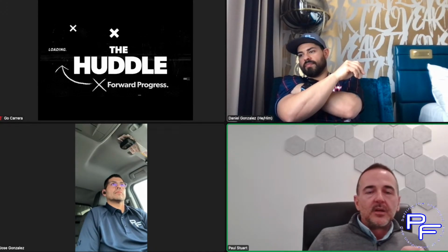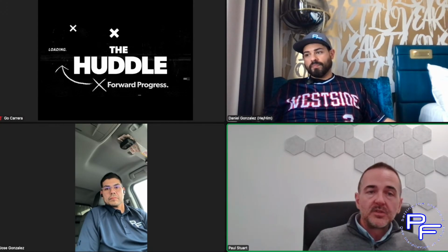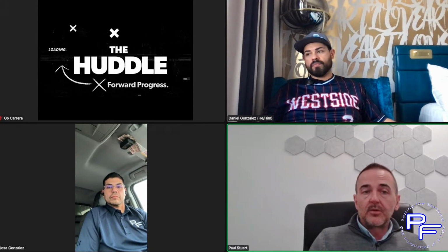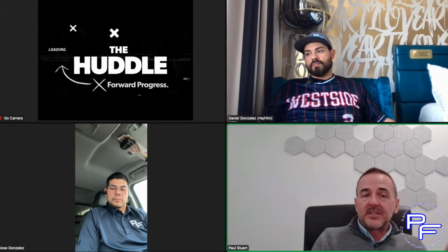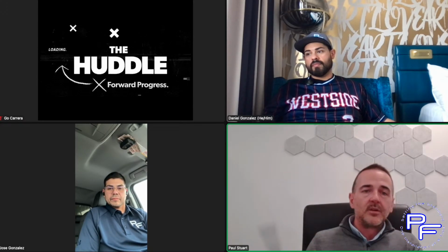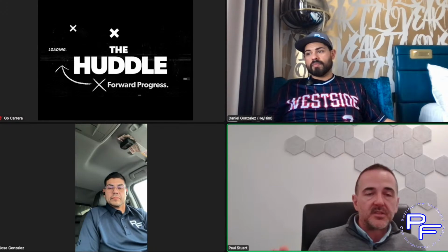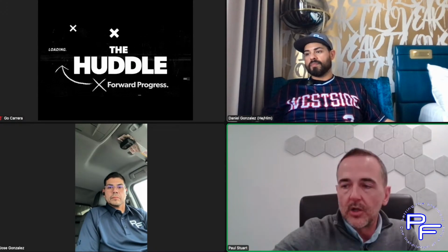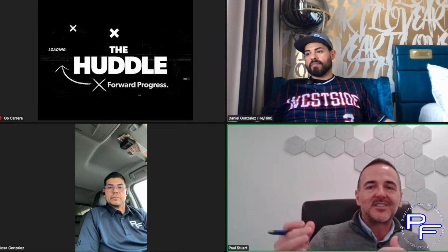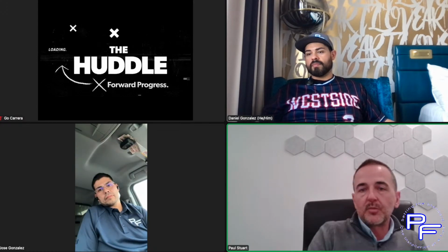So making your bid somewhat consistent. If you can find some nuggets by using the industry knowledge, whether it's ASTM F710 for resilient, or the TCNA handbook for tile, or something in CFI's stuff for carpet, or the Carpet and Rug Institute, right, even 104 something and that 105, that gives you a strategic advantage because of knowledge, and it's not a discrepancy in the drawings. It's something that brings you a nugget in knowledge. So, take advantage of those opportunities to win a job, and don't be scared of change orders if they're warranted.